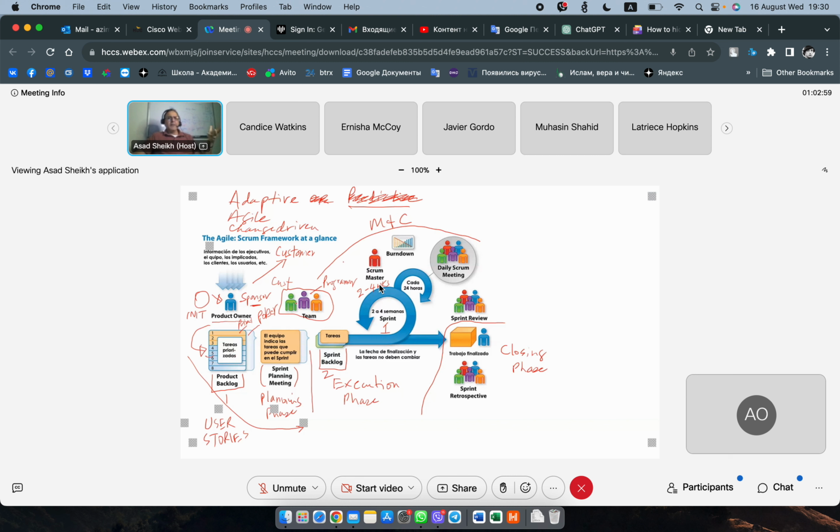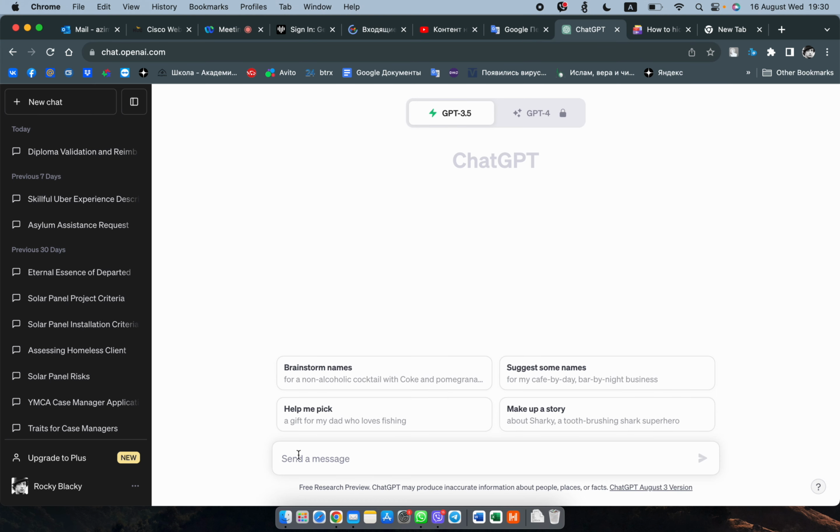Say they're building a website, and they don't want to build the whole Amazon.com because that's going to take a lot of time. They just want to build the front end, maybe the first few pages, the basic functionality. So the first 5 user stories may be just about the first few pages. They said, we're going to do this, we can get it done in 2 to 4 weeks. They now have an agreement with the product owner and the customer that they're going to do the first 5 in the sprint, and they're going to put those 5 in what they call the sprint backlog.